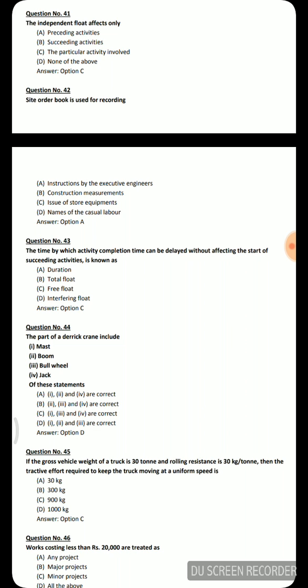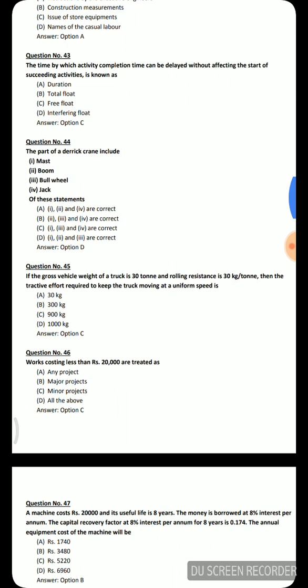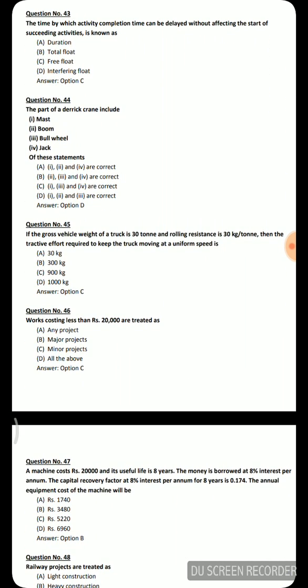Next question: site order book is used for recording — option A: instructions by the executive engineers, option B: construction measurements, option C: issue of store equipments, option D: names of the casual labor. The correct answer is instructions by the executive engineers. When an engineer visits the site, the instructions given are written and recorded in the site order book.